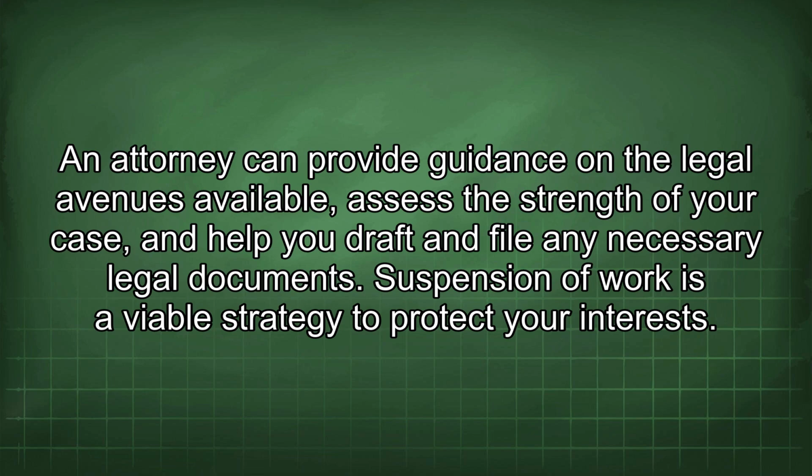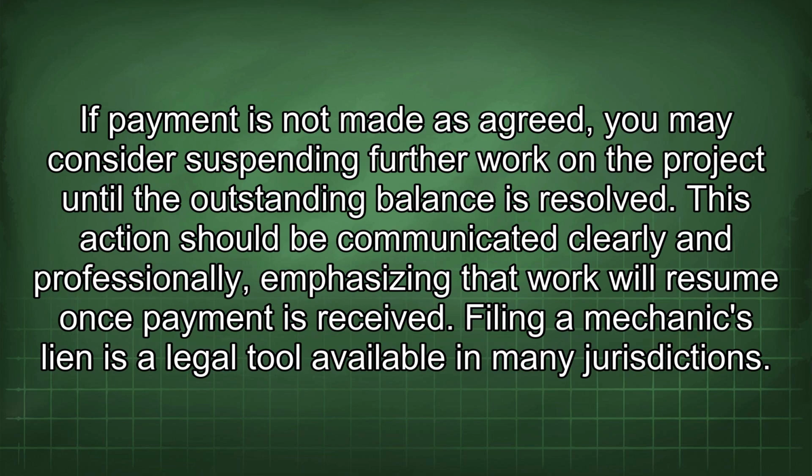Suspension of work is a viable strategy to protect your interests. If payment is not made as agreed, you may consider suspending further work on the project until the outstanding balance is resolved. This action should be communicated clearly and professionally, emphasizing that work will resume once payment is received.